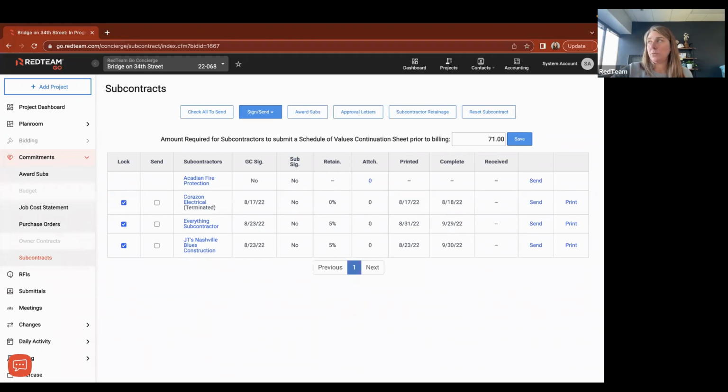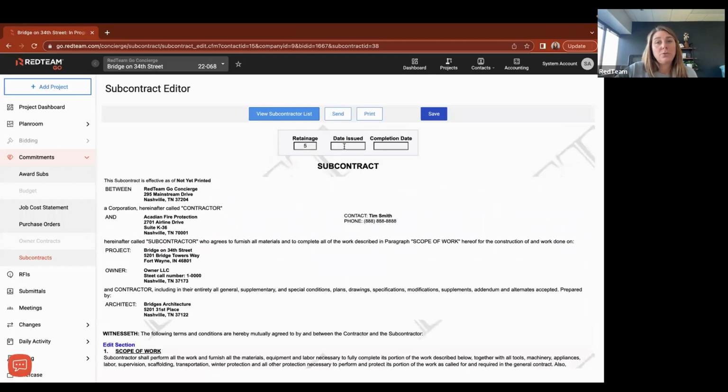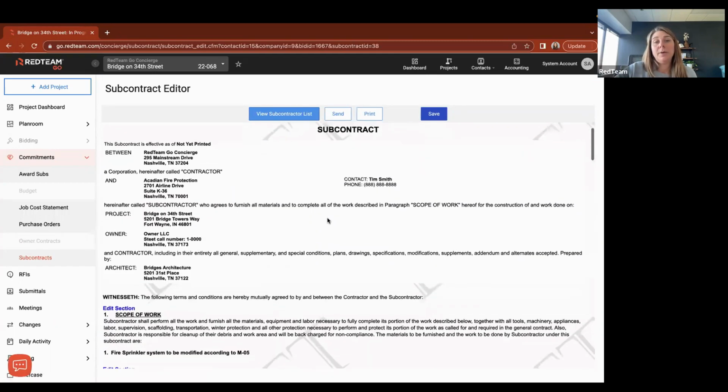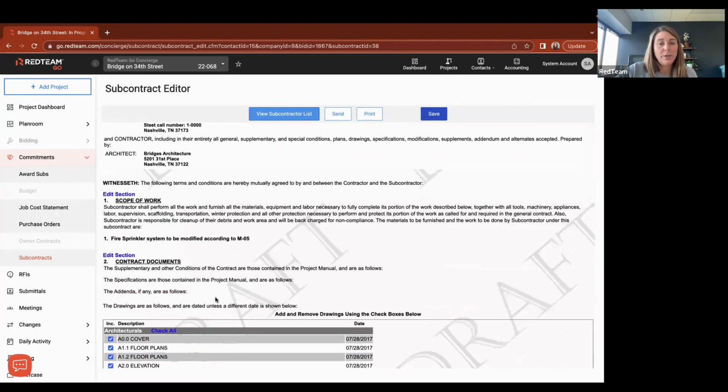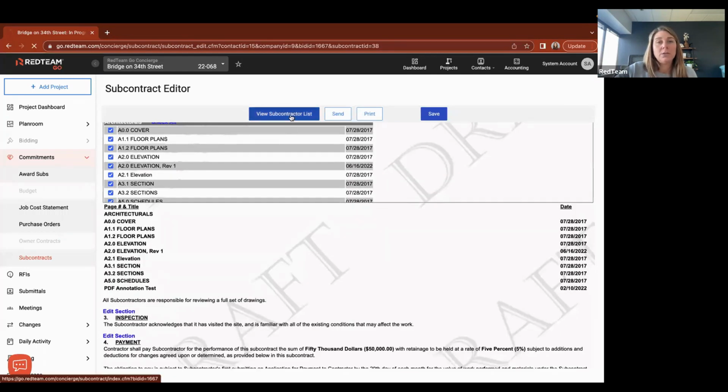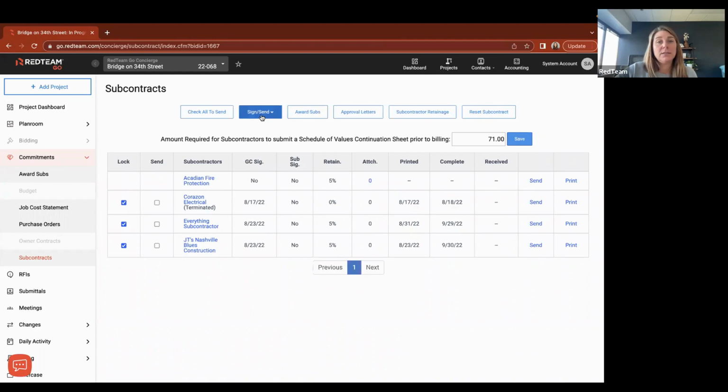Okay, Kevin, you've got a great question. Once the sub signs their contract, is the best workflow to issue a purchase order to a sub? In our system, we call that a subcontract. So we would issue them a subcontract agreement, which is what I've got open right here on screen. So we're going to open the subcontract agreement. We're going to put in the retainage percentage. Pasker is going to auto-populate as much as we can for you. So everything that you see in bold here, we're pulling into the subcontract agreement for you. So then you're going to lock the contract and sign it and send it to them, and that will commit the cost in the job cost statement.